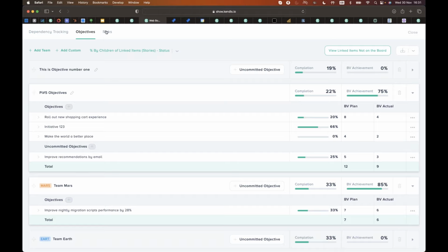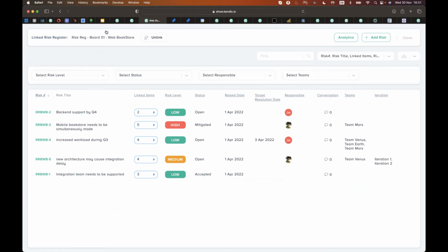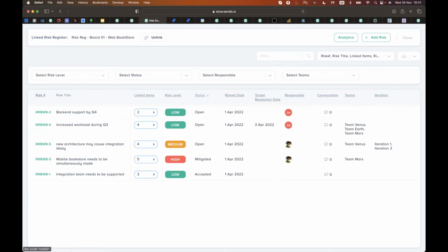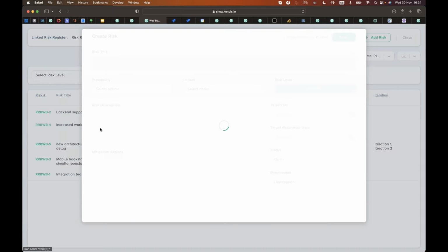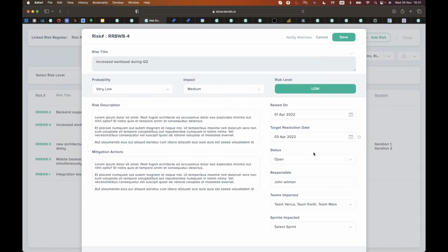When we talk about risks in SAFe, predominantly we talk about ROAMing the risks, but we have a risk register here. If you did just want to write, we've got a risk here, and then we want to say that it's resolved or owned, accepted, mitigated, or the ROAM type statuses, then you can. We don't stop you from doing that.